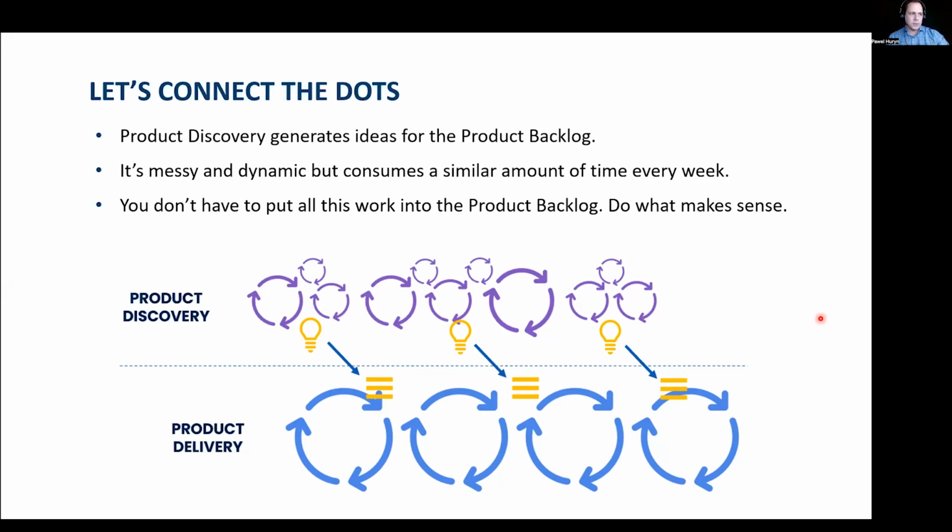So for example, if there is work connected to interviewing a customer, for me, it doesn't make sense to put it in the product backlog because this is something totally different, and we would keep our notes on some Confluence page, or we will have some meeting in the calendar, rather than making a product backlog item only because we need to interview the customer. It's really not related with the sprint goal. This is something that is done in parallel, but if you want, you can implement some workflow of product backlog items and have some draft states for the ideas that need to be validated.